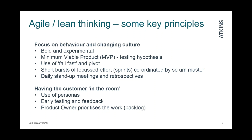True agile requires a team to be co-located. Our teams are distributed all over the world as a large global organization, so we tend to flex the rules a little — we use Skype, share screens, and get together on conference calls for our stand-ups. It still works. A really important principle about agile is about having the customer in the room. This might be an external customer or an internal customer or set of stakeholders. We use the principle of product owner — somebody in the business who owns the business requirements and is able to make informed decisions about prioritization of work and effort. The product owner attends the stand-ups and weekly meetings and really calls the shots in terms of prioritization to make sure we're focused on the things that matter most. It's incredibly powerful as an approach, but it requires a large degree of openness and very rich collaboration — challenging to begin with, but in my view worth the effort.